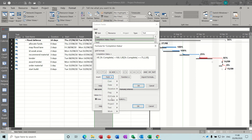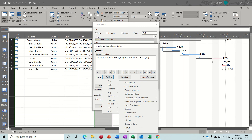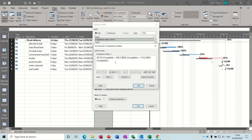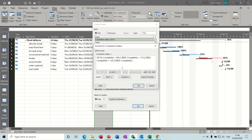Go and get the field — I like to click on it just in case I do a typo. So now it's going to be: if that is greater than or equal to 25, comma, 3. And you can put whatever range you like. Then the last if statement: IIF, open the bracket, get the field — if it is greater than or equal to 0, comma, 4. Now there are 4 if statements so I need 4 close brackets: one, two, three, four.